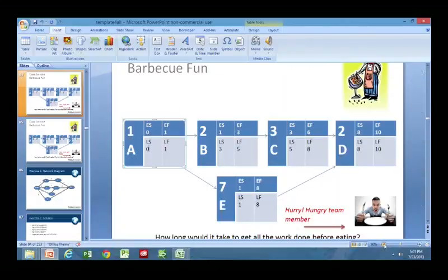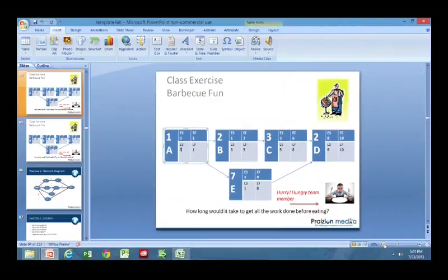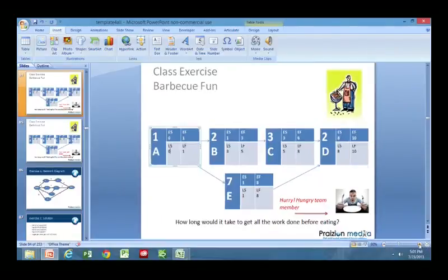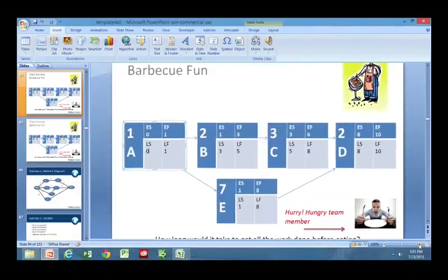And that's our zero method. In the network diagrams, you could be asked questions such as, what is the critical path? You do realize the critical path is the longest path in the network diagram, which shows you the shortest amount of time within which you can complete the project or the schedule.